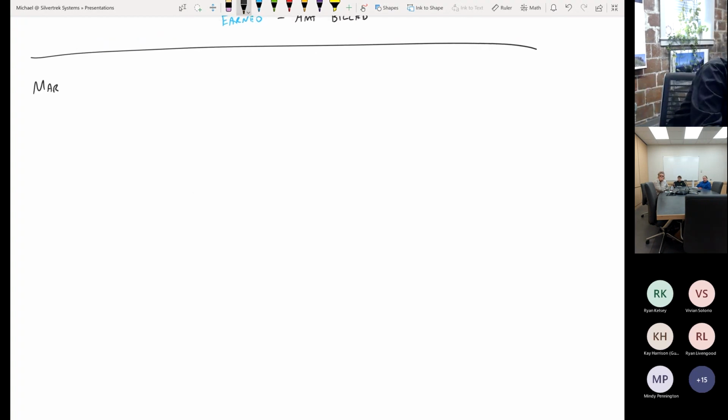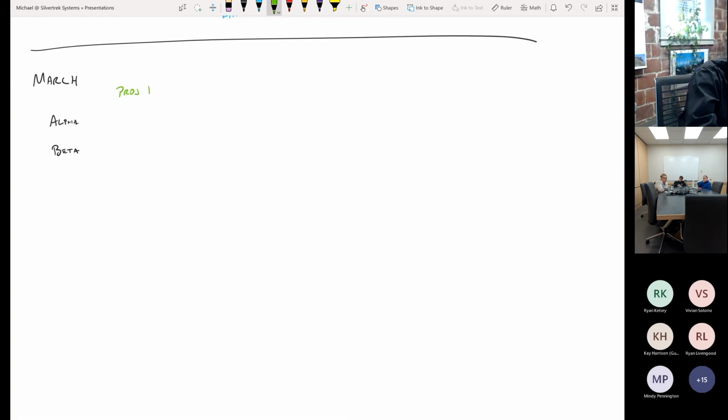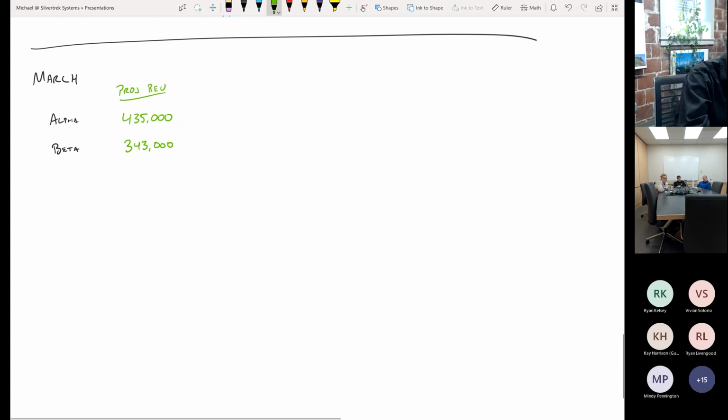So let's pretend that in March, our company had two jobs, right? And we'll just call it alpha and beta. So we sat our project managers down and we said, hey, project managers, can you please give us the projected revenue on your jobs? So the two project managers gave us their projected revenue numbers. On alpha, the projected revenue at the end of the job was $435,000, and on beta it was $343,000. Then we looked inside of the accounting system and we said, well, what is our bill to date?